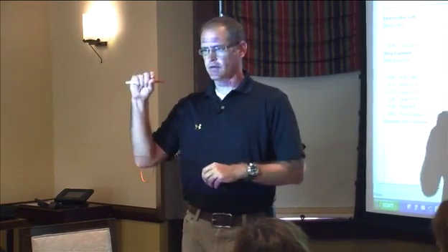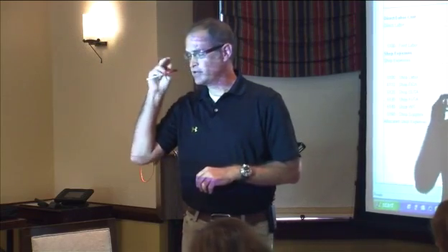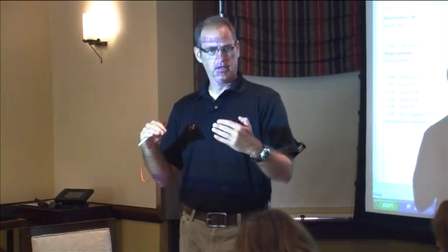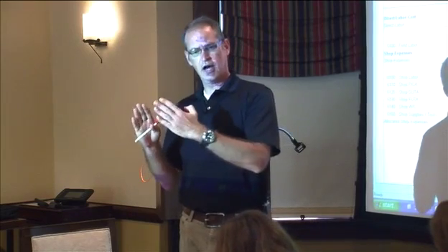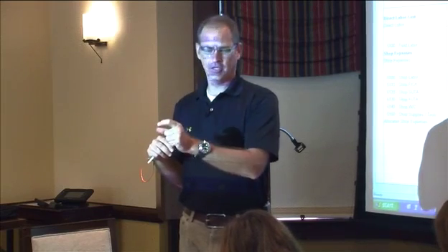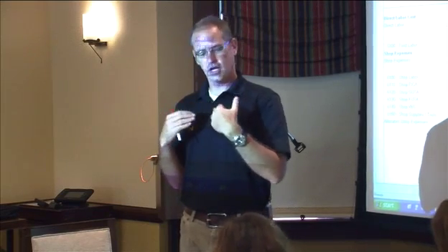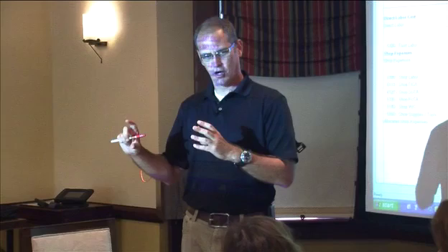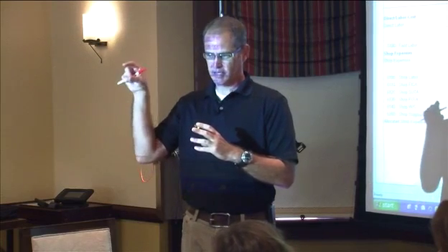In the notes that I wrote before, it's one of those things where you can start small. You can start with one cost code. And then as you're working towards the structure that you want to develop, you say, let's now break this down because I need to track this. I need to know if hauling is something beneficial for us to do or if it's beneficial for someone else to do. So I'm going to break this cost code out for hauling and put my subcontractor costs there.